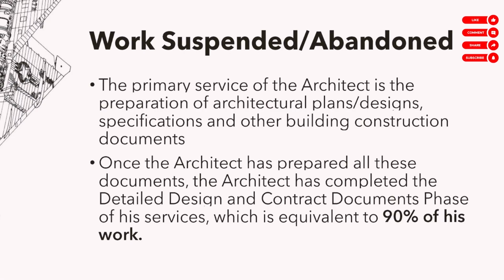The primary service in the regular design service is the preparation of plans. And that's why once the plans are done, once the architect has prepared all of these plans, then the architect has completed the detailed design and contract documents phase of the project, which is equal to 90% of the work. Again, tapos mo na yung contract documents, you're 90% done with the job.